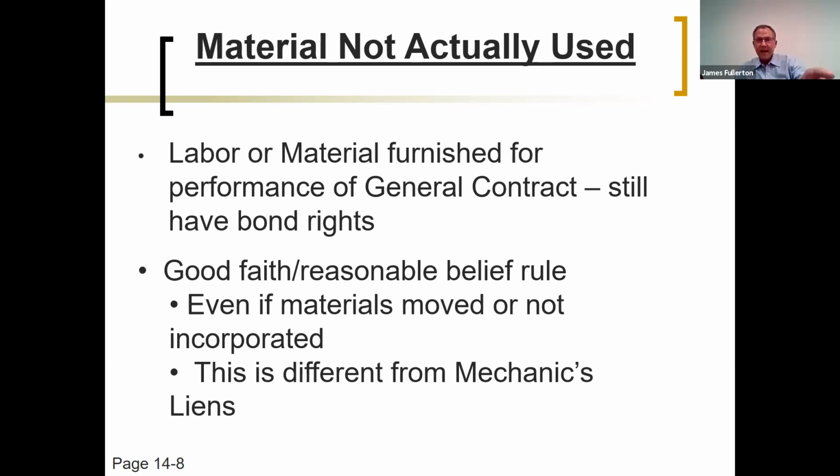If that supplier had a good faith, reasonable belief that they were supplying material for a bonded project, they still have rights under that bond, no matter where the materials are eventually used. And that's very different from mechanics lien rights.